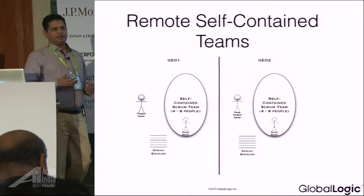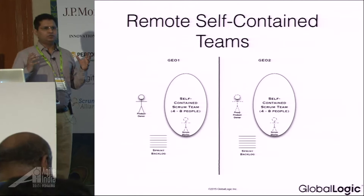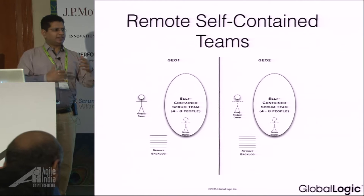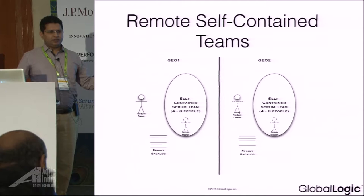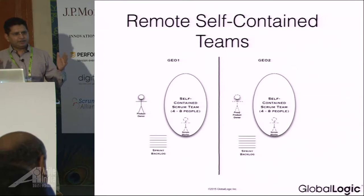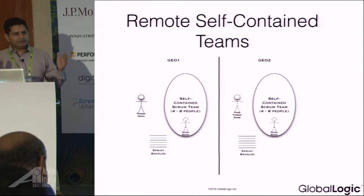You can avoid all the problems that come with distributed communication — working late nights and so on. This can work when there is loose coupling in the features. If one bug causes a problem in another feature because of tight coupling, it's not going to work. If you need a lot of back-and-forth communication, again it won't work. But many times I have seen that distributed teams were created before people even considered whether they were really needed.